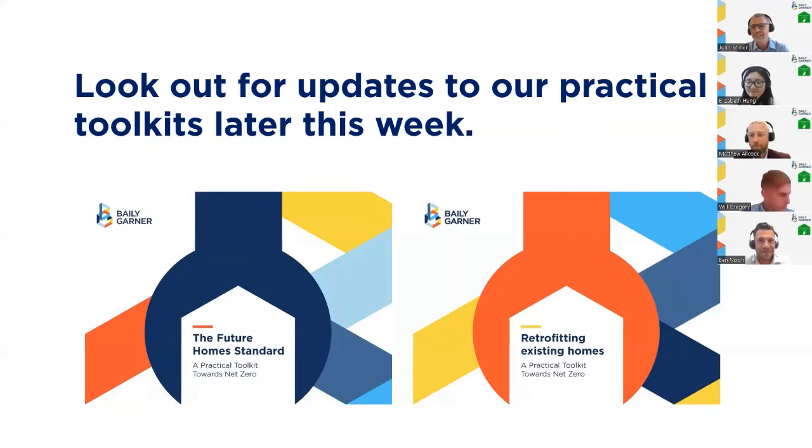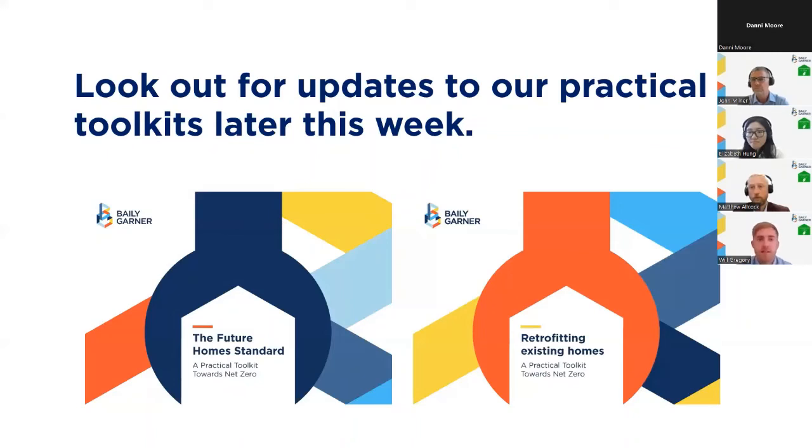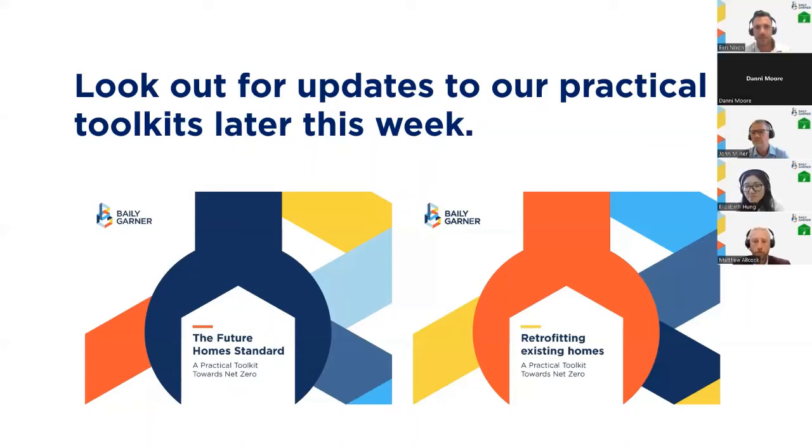Do you want me to start with that one, John? Yeah, go on then. I think obviously the PAS 2035 process and the retrofit agenda is relatively new to most organisations, and that will naturally come with a learning process. Things may take more time, and that could subsequently come with some additional costs. I think there are opportunities for that to be made more efficient, and that's where services with contract administration could be overlapped to get some efficiencies there. But I also think the PAS 2035 approach and the focus on quality and getting things right will hopefully in the long term avoid having to rectify subsequent defects and issues with the work. So with a longer term view, it will be beneficial from a cost point of view.